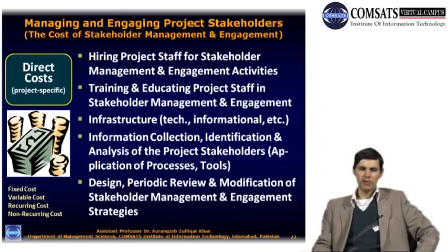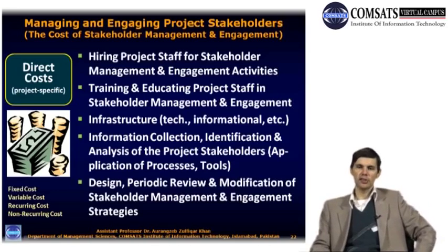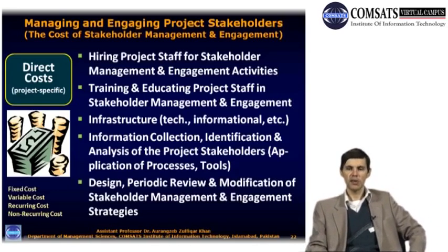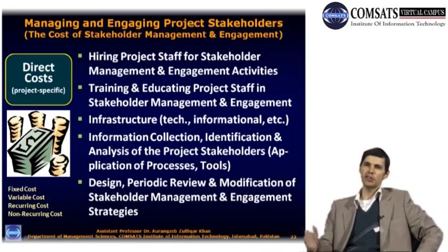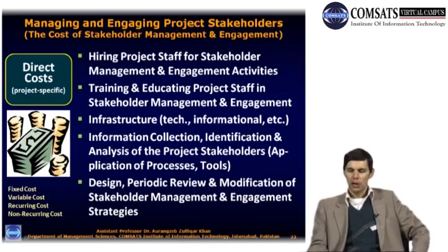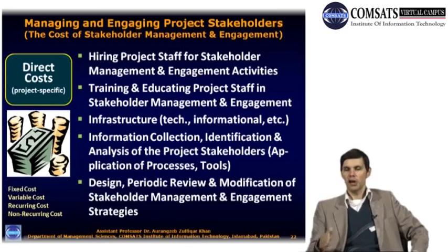Some other costs which I have given over here: direct costs, hiring staff for stakeholder management and engagement activities, maybe a stakeholder manager on the project, training and educating project staff in project management and engagement, maybe sending them to a workshop. Having said that, there are not many workshops which are being offered on project stakeholder management and engagement, but if there are, this would then be one potential cost which could be incurred.